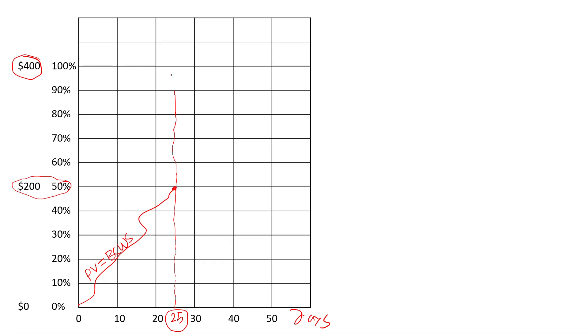Now, we are at day 25. This is today, day 25. We're looking at what's going on with the project. For some reason, things didn't go that well. We are right here, just finished 30% of the work, which is 30% of $400 is $120 worth of work. This is called the earned value.